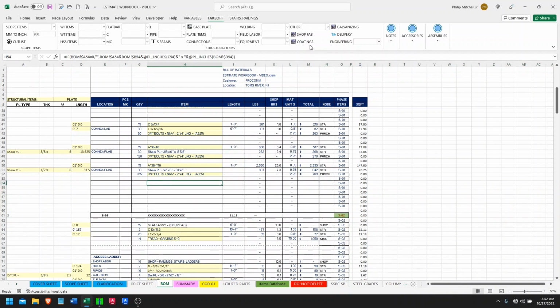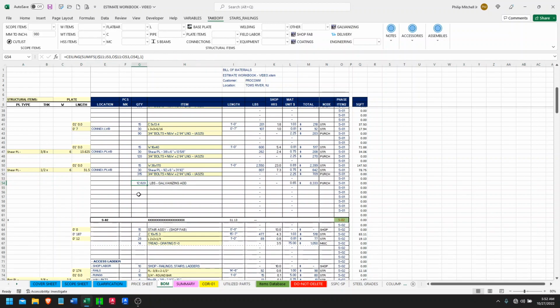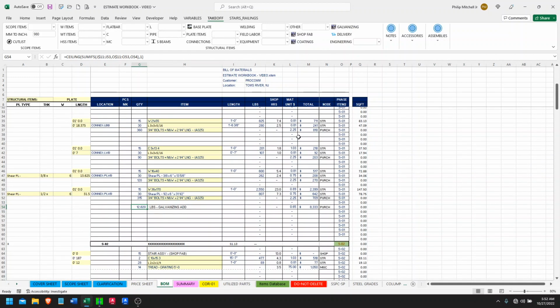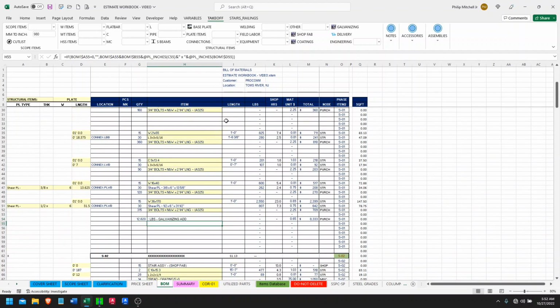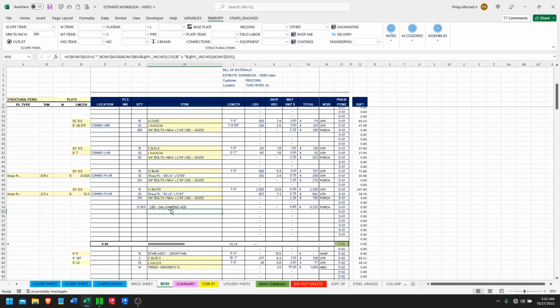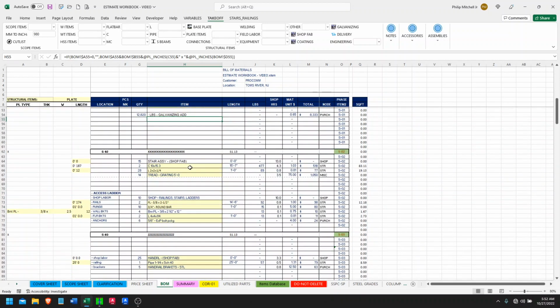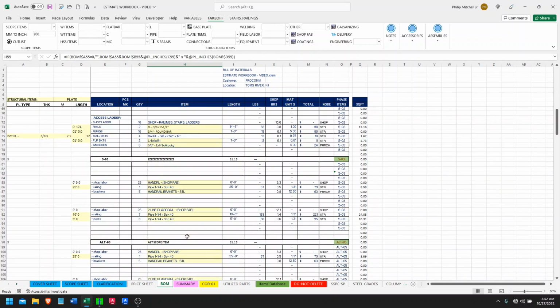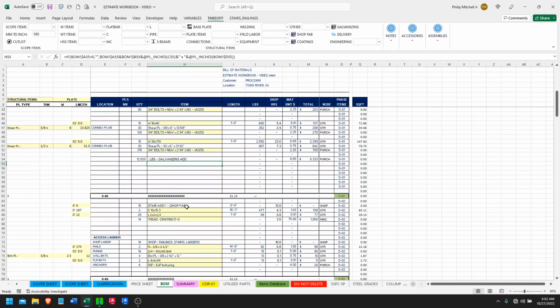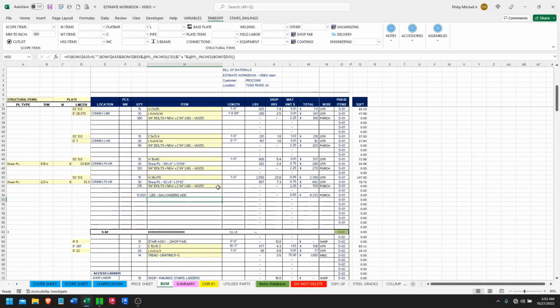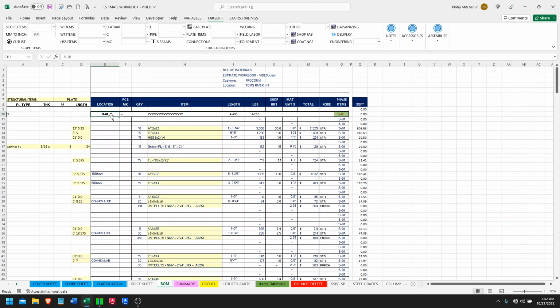So let's say it's getting galvanized. So there's your galvanized. Just going to add up basically the weight, and then you could add the shipping here in this scope item, or sometimes I'll have one scope item that has all my deliveries in there and field and all that stuff. But there's your coatings, finishings. What I just showed you is only accounting for this scope one, S1.